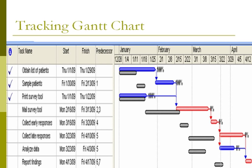The first three tasks have been completed, indicated by the check marks in the far left column. The blue line in the Gantt chart indicates the actual duration, and the gray line indicates the expected duration of each task. Thus, for the completed tasks, it is visually shown that obtaining the list of patients and sampling patients took longer than planned, while printing the survey took the length of time as expected.